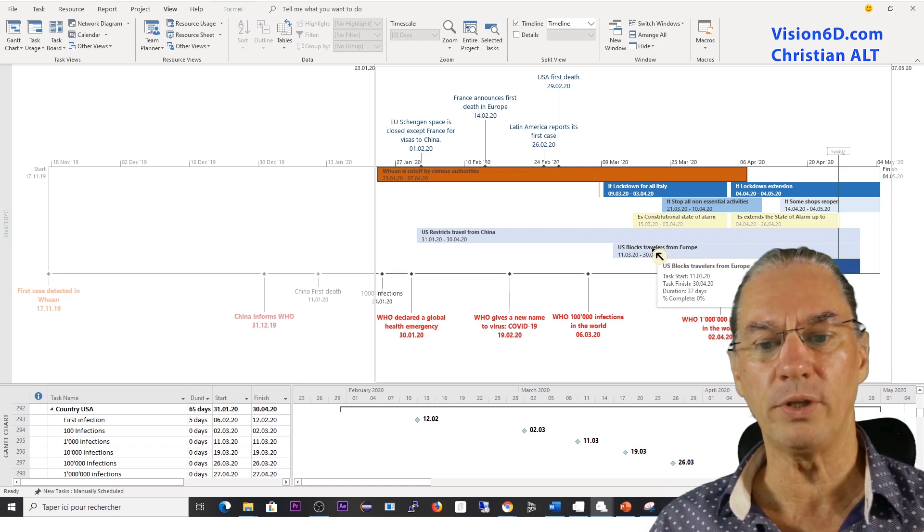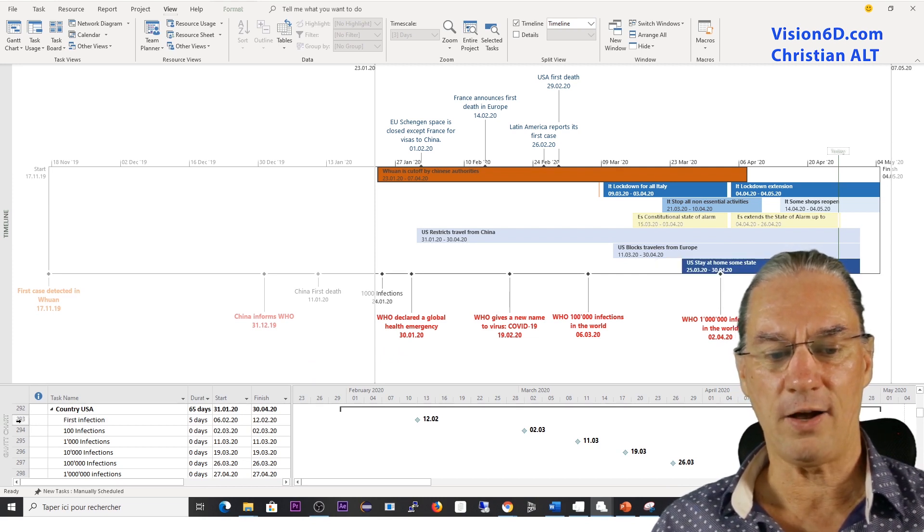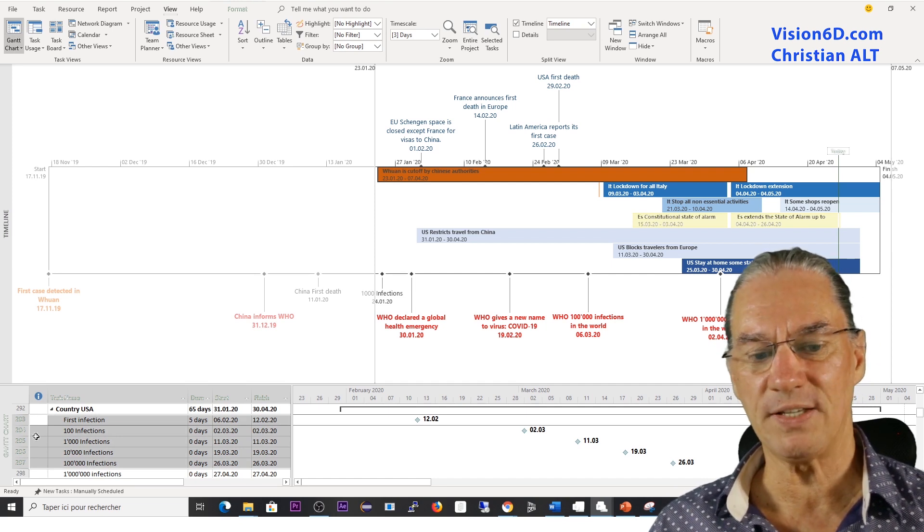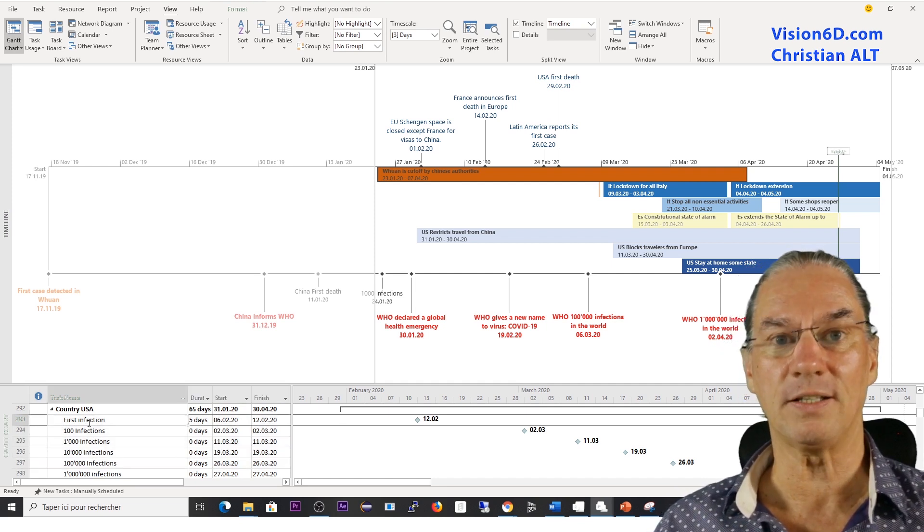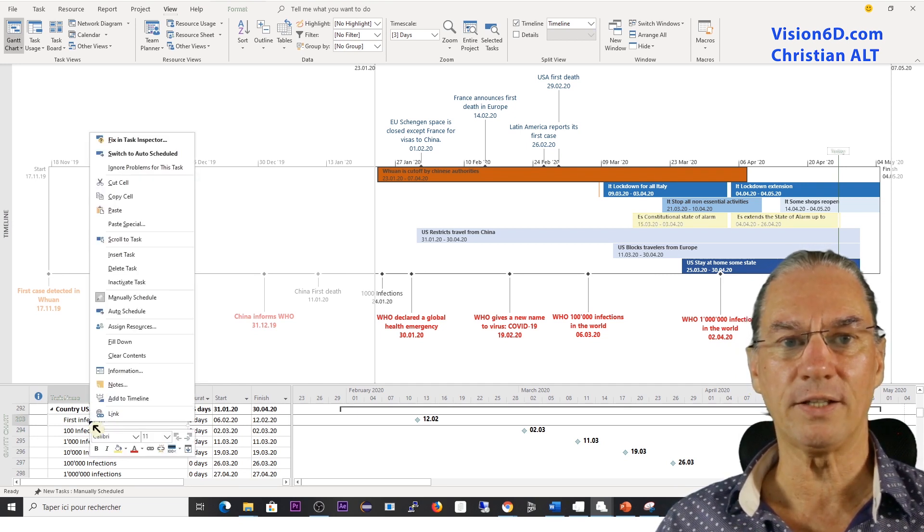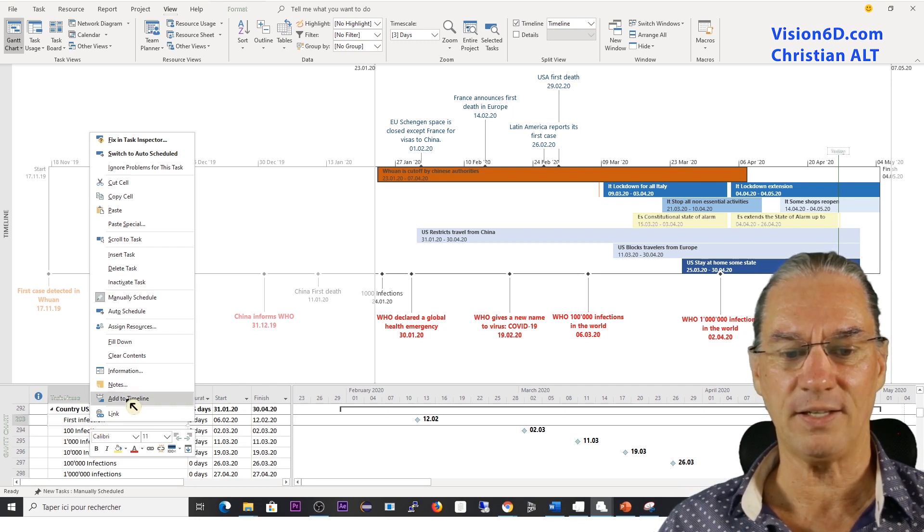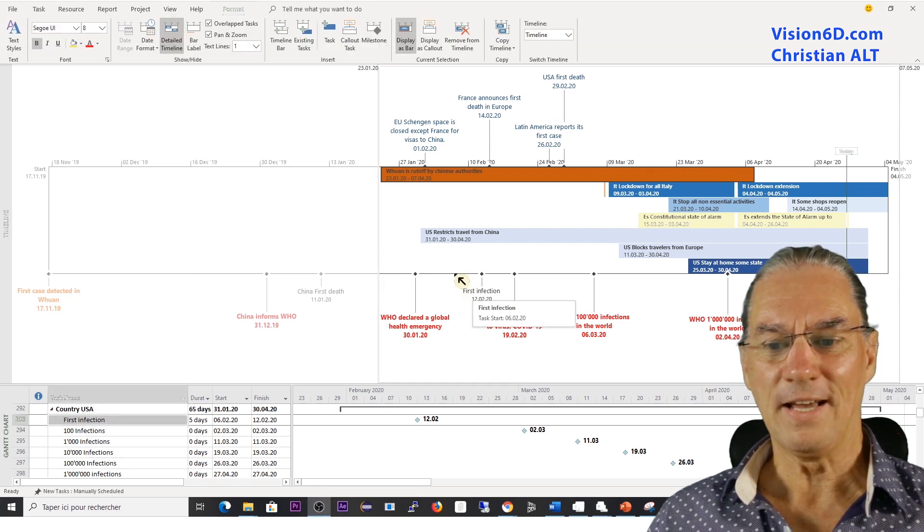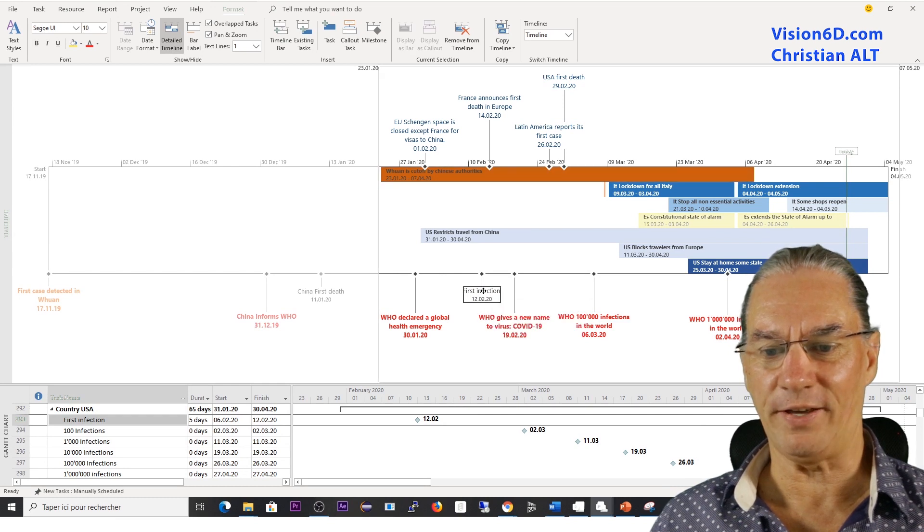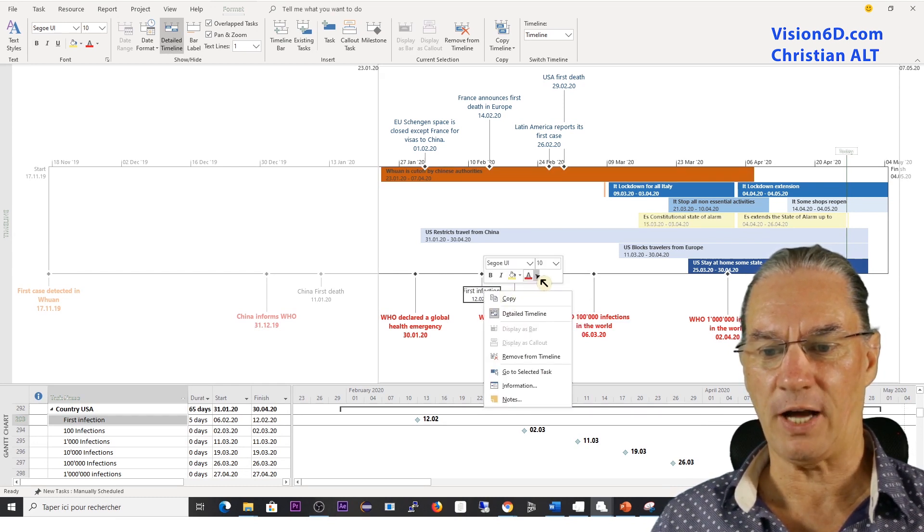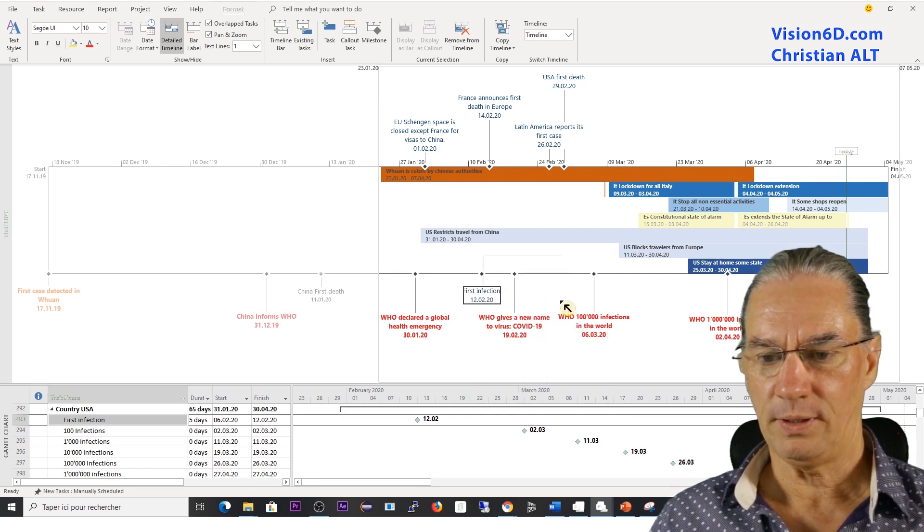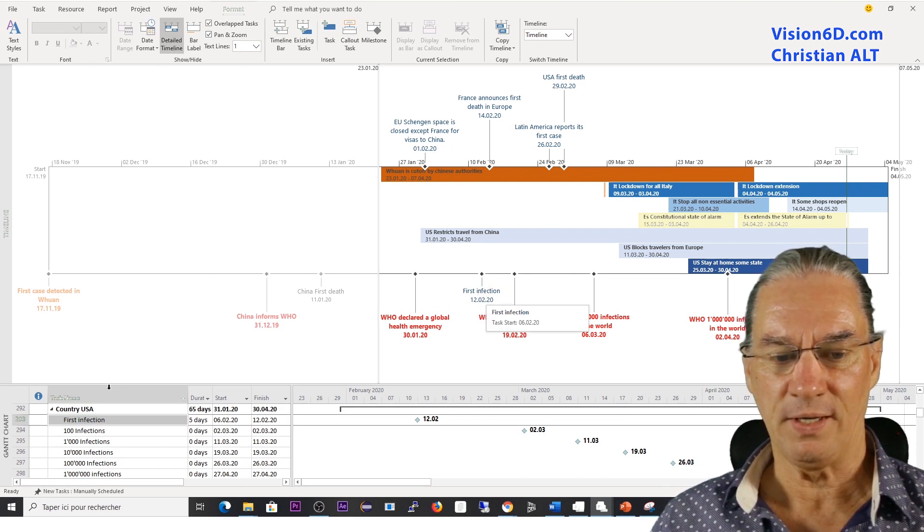So what I'm going to do with you now is to show you how I bring those milestones here into this timeline. And you will see that it is really easy. And for this I simply right click on the task or the event and you see that here we have the possibility to add it to the timeline. So it went here into the timeline. We find it here. We are maybe going to change the color of this and make it darker blue. Like that we see this is relative to the first event in the U.S.